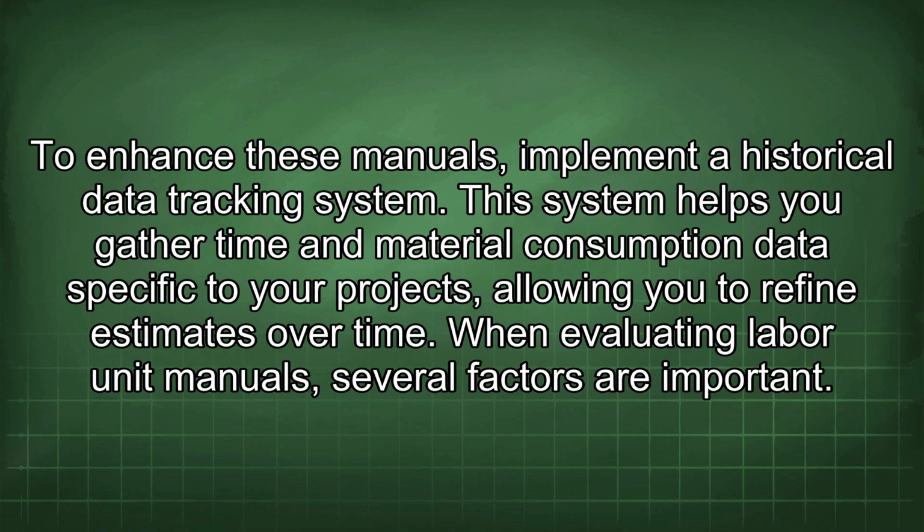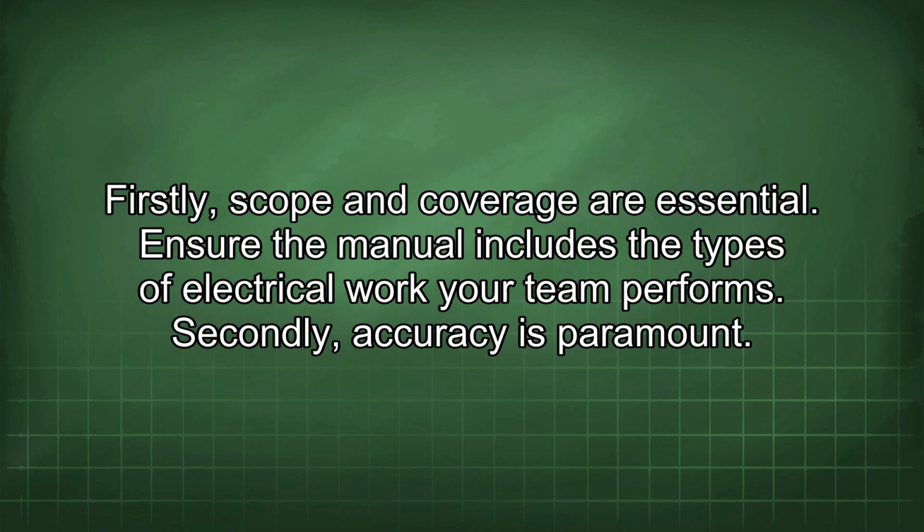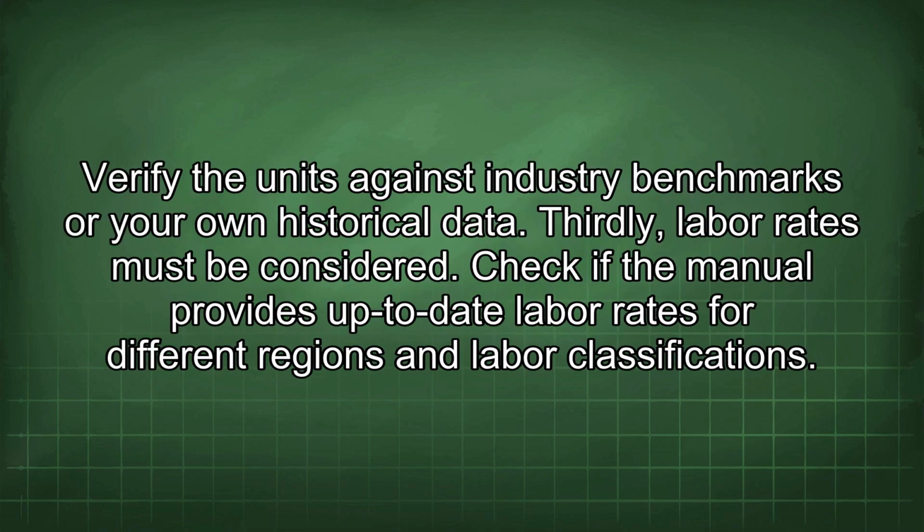When evaluating labor unit manuals, several factors are important. Firstly, scope and coverage are essential. Ensure the manual includes the types of electrical work your team performs. Secondly, accuracy is paramount. Verify the units against industry benchmarks or your own historical data. Thirdly, labor rates must be considered. Check if the manual provides up-to-date labor rates for different regions and labor classifications.